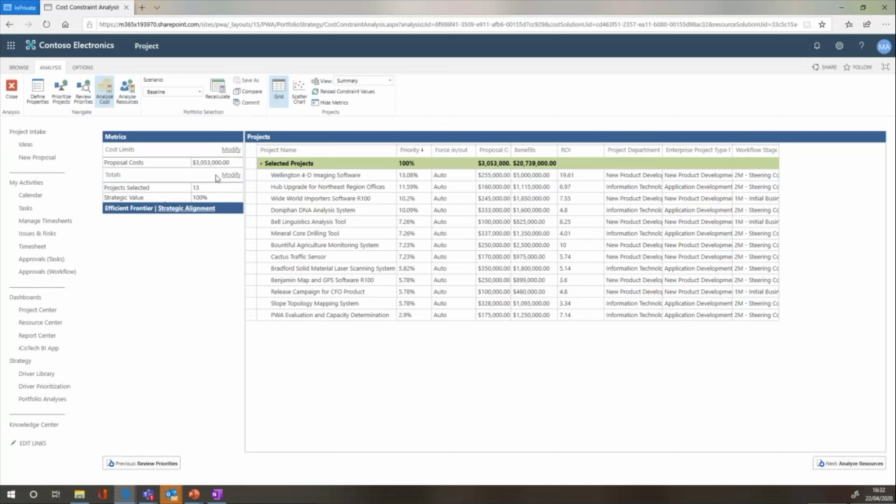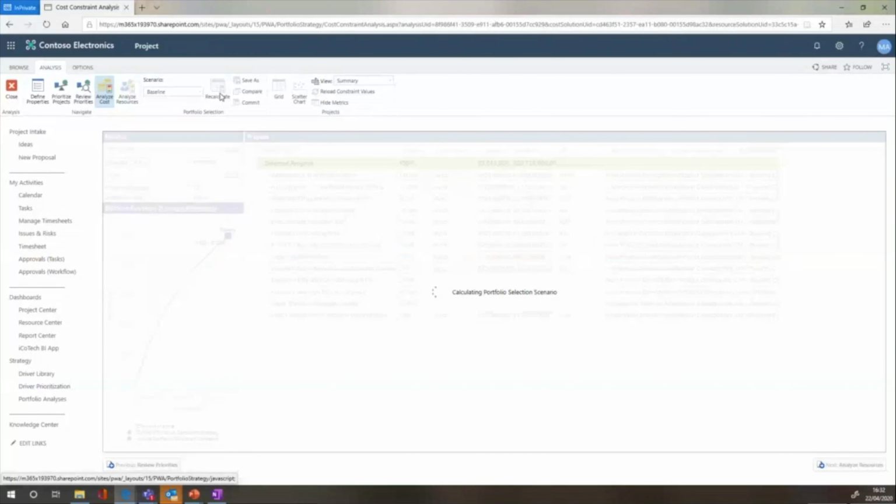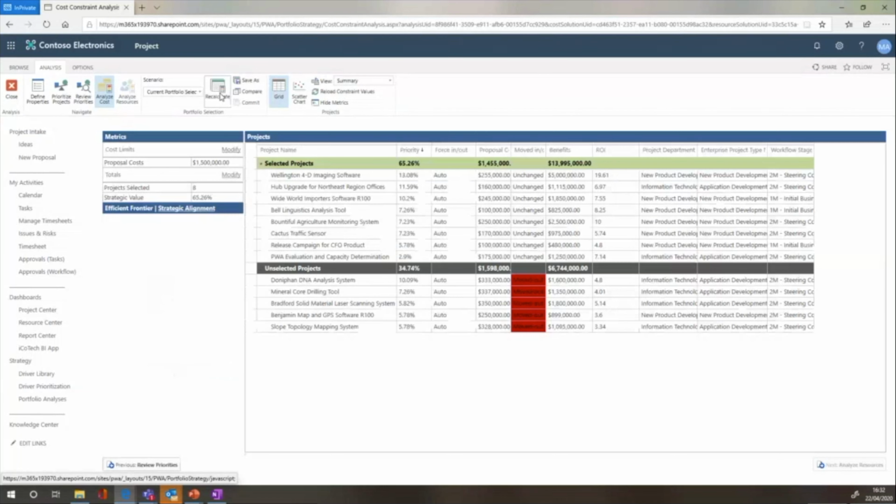So you can say, what about our investment? What if I've only got £1.5 million to spend? How many zeros is that? Enough zeros. I need to put a budget with constraints. Therefore, those lowest value projects drop out of your portfolio. And that's the type of stuff we were doing across Babcock with 65 projects in the portfolio, well over £10 million worth of spend on an annual basis.